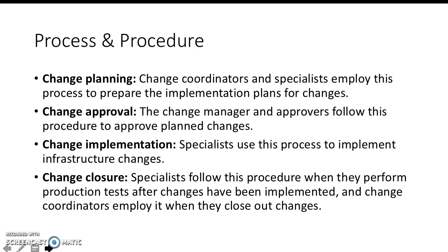Okay, so the change manager and approvers follow this procedure to approve the planned changes. And we also have the implementation stage of the change, where specialists use the process to implement infrastructure changes. Then there's the closure part of the change, where specialists follow the procedure when they perform production tests after changes have been implemented, and change coordinators employ it when they close out the changes.